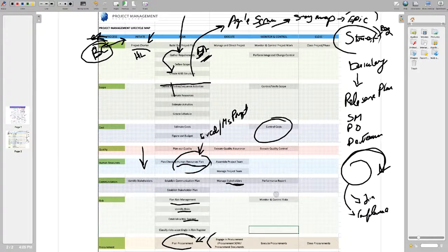Also, there's a way you can use earned value and a burn down chart to combine it together to monitor costs on the Agile portion of the execution. Obviously, monitoring and controlling risks, you would do by identifying a risk register that you would monitor every single week based on the waterfall type of approach. Quality control, you can use, again, the traditional waterfall model.